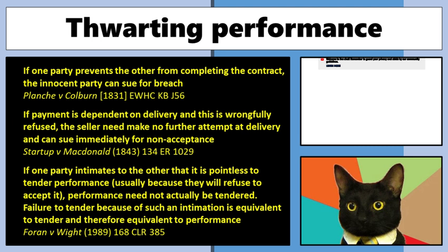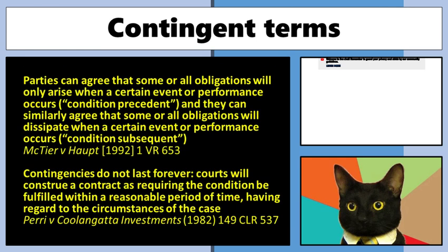All right. Now, sometimes in terms of performance, it doesn't necessarily start when the contract's formed. Sometimes you can have in a contract that says performance for this contract will only begin from one or both parties when a certain event happens or a certain time passes.